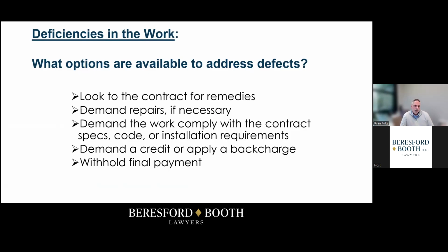You should always demand repairs, or demand that the contractor perform, at his own cost and at no additional cost to you, work that is compliant with the contract, the specifications, and the code. That can be done informally, it can be done through email, it can be done via letter, but the demand for the work and the request that the contractor come back and complete the work in an appropriate manner is always an option that an owner has.